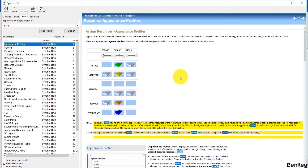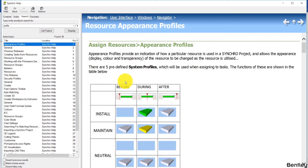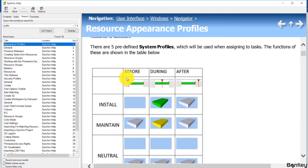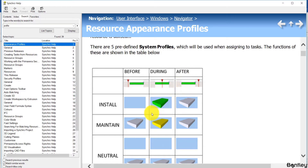The first option is Appearance Profile. Resources can be assigned to tasks. However, if you've seen any 4D simulation, not all the resources are assigned to tasks in the same way. For example, if you use the Install profile and drag your focus time, before the task there will be nothing, and during the task the resource is highlighted. The resource is highlighted when it is being worked on.